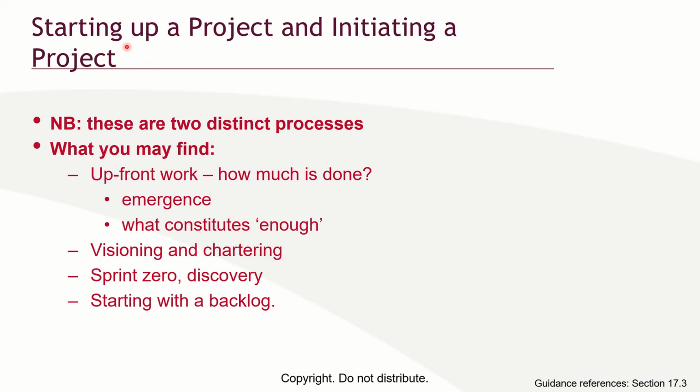What you may find under starting up a project is, one, upfront work, where you calculate how much it will cost to do a project. You look at the vision, you look at your discovery, and this is a zero sprint. Zero sprint means that at this point, nothing has been started.